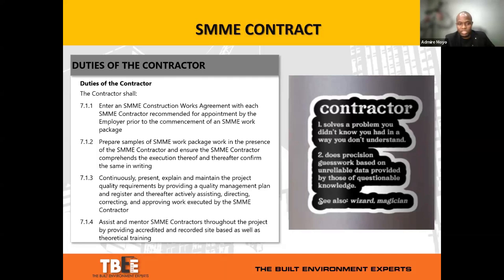7.1.4 is to assist and mentor the SMME contractor throughout the project by providing accredited and recorded site-based as well as theoretical training. Again, institutions like the Gauteng Development Corporation are quite good at providing budgets for accredited training, but some institutions don't do that. Quasi-governmental institutions don't do that. So again, it's a matter of confirming with the employer at the start of the works whether it's accredited training or non-accredited training.